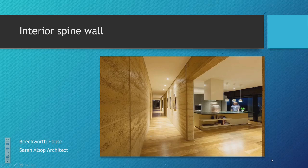You all know this. I'm just saying how different this campus was, because rammed earth is a tiny and little known industry. I mean, we all think it's huge, but it's tiny. Commercial scale estimators can be really nervous about our product. The process of submitting our price is often they'll ring us up and say, "Oh, geez, Rick, do you mind driving to Adelaide tomorrow and have a chat to our estimators about how we're going to build this?" And they want to pore over the construction sequencing, the safety aspects, access issues and timing. Unlike a bricklaying company who simply put in a unit price for laying, so many buildings are brick or block work, and estimators understand that stuff, they do it all the time, but rammed earth is something completely new for them.